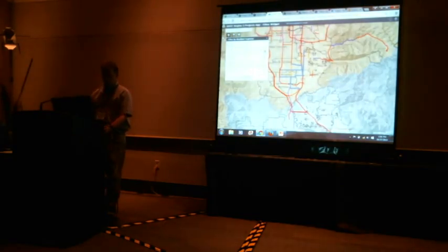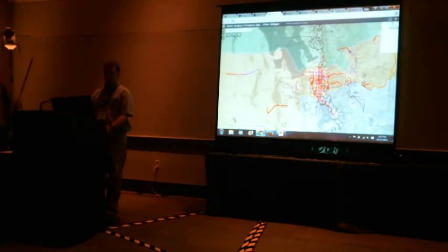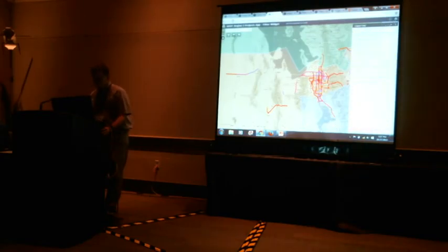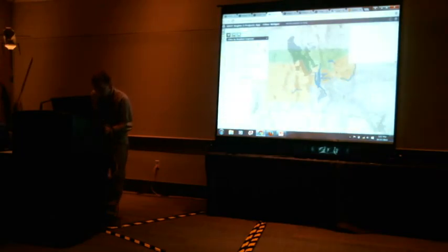But the real important thing that they wanted to use this for, that I haven't really shown to them yet, is they want to see where projects do not have an engineer assigned and who should be assigned to that. And what I've done here is, let me turn off this city's layer so it looks a little cleaner. If I click on this back here, go back to the options and clear the results here. What I want to do is take a look at anything that is unassigned. And I can add this as an operational layer. What that means is it's its own separate layer, so I can just have it turned on and hit apply. And right now I can see there are 204 projects that do not have a person assigned to them.